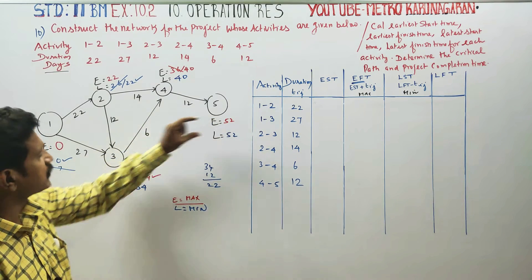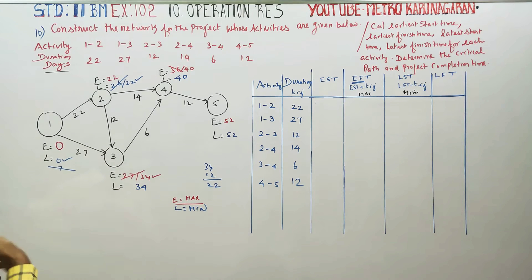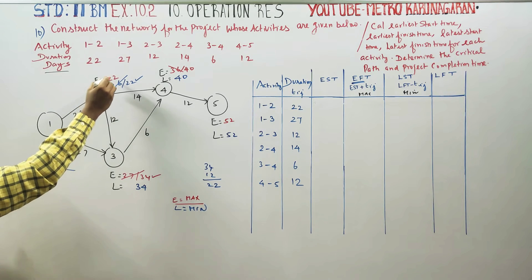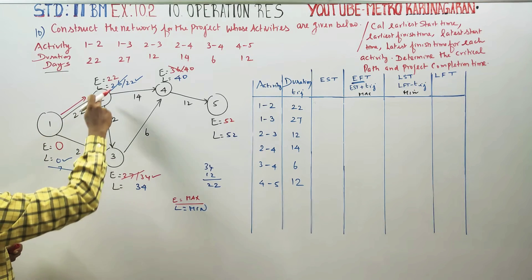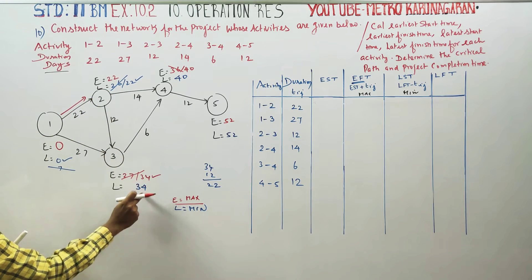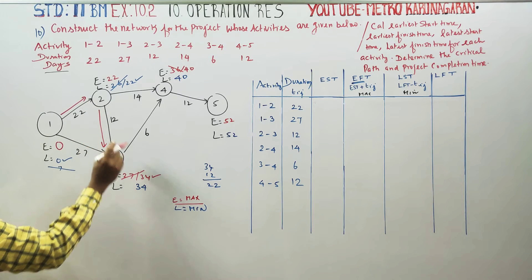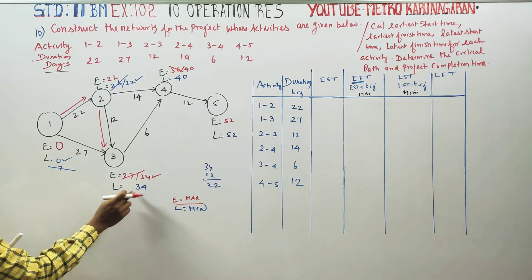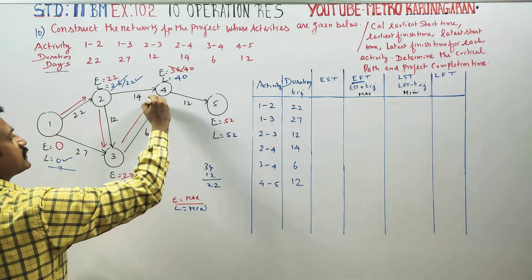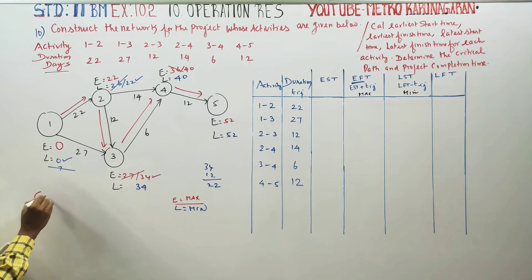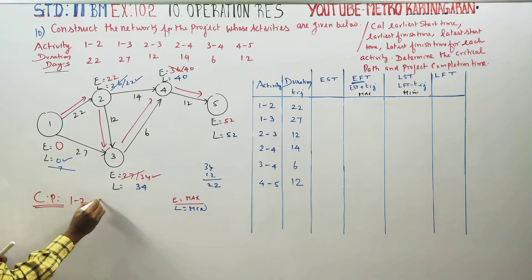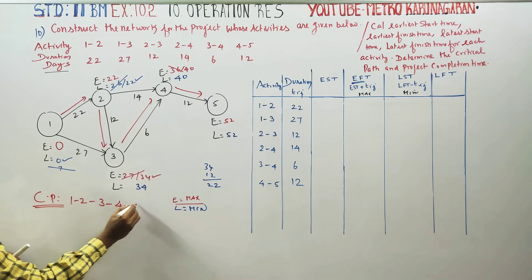If E and L are the same, it is the critical path. Critical path: node 1 has E=0, L=0 — same, so it is on the critical path. Node 2: E=22, L=22 — same, critical path. Node 3: E=34, L=34 — same, critical path. Node 4: E=40, L=40 — same, critical path. Node 5 is the final node. Critical path is 1→2→3→4→5.